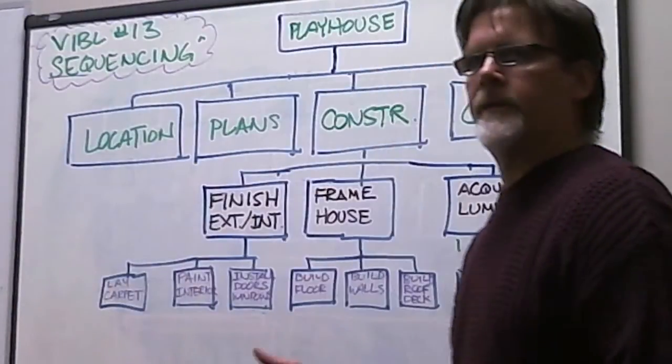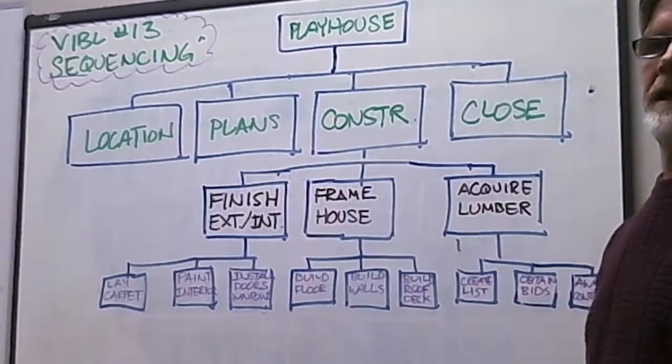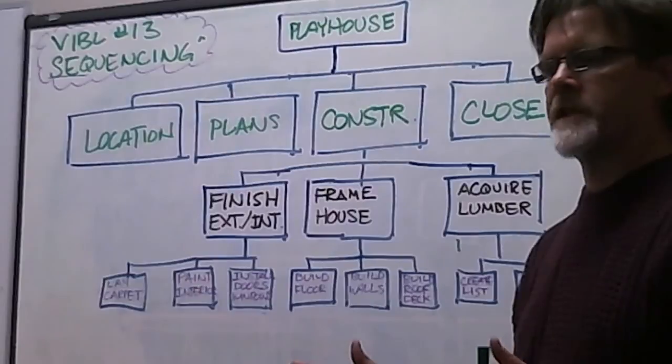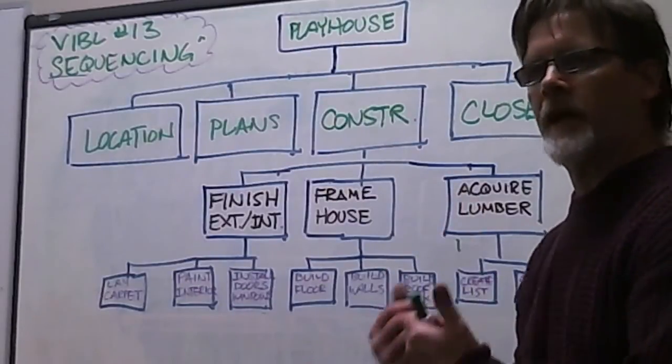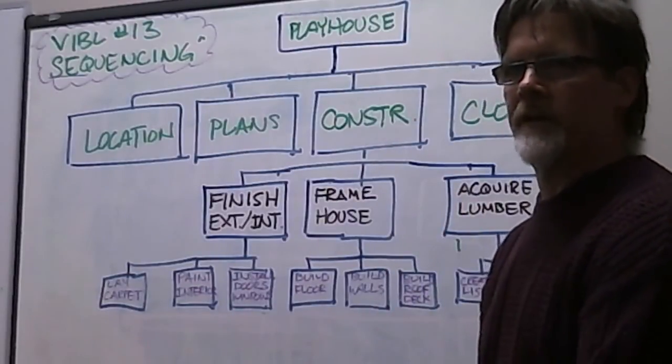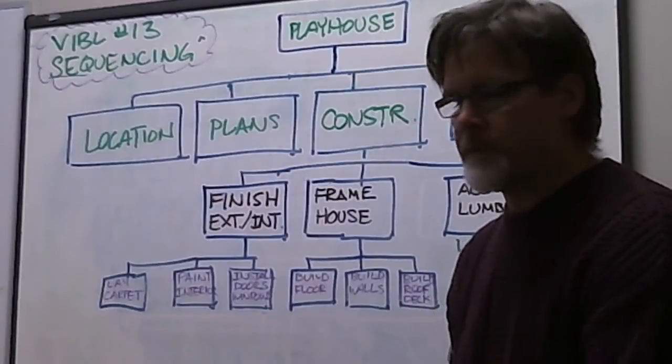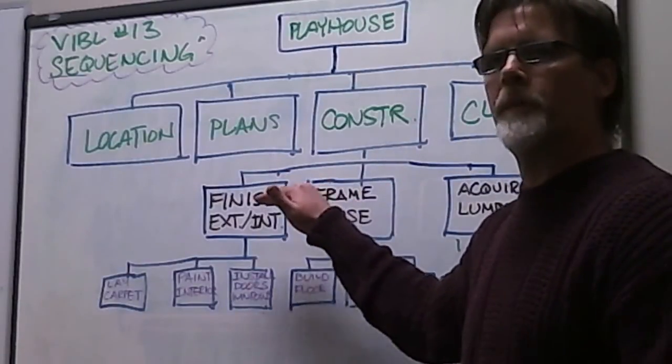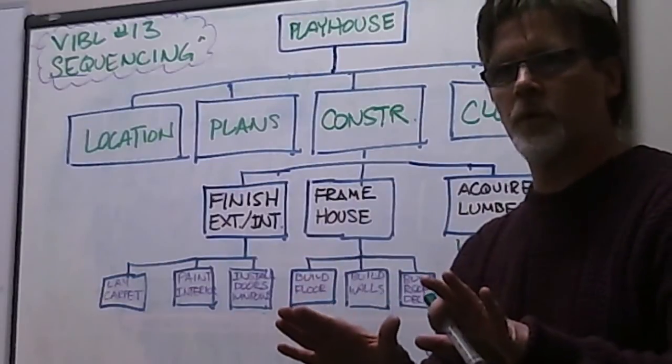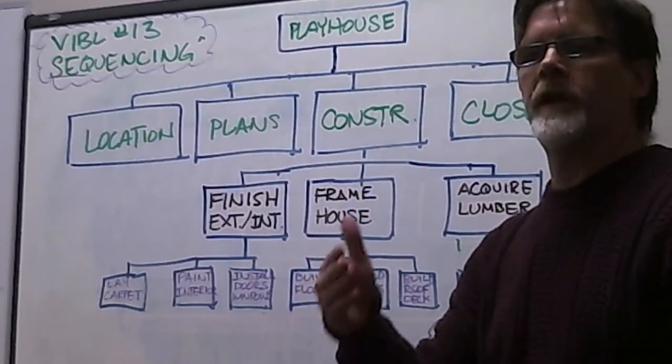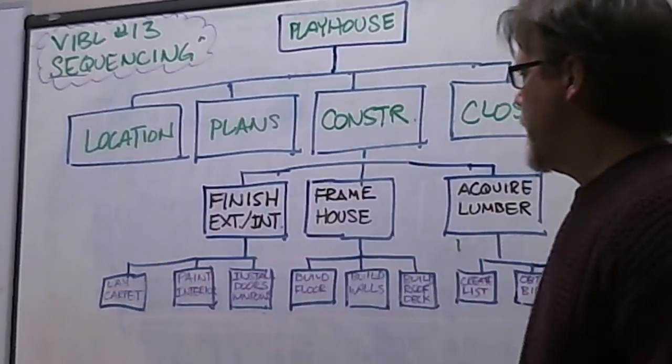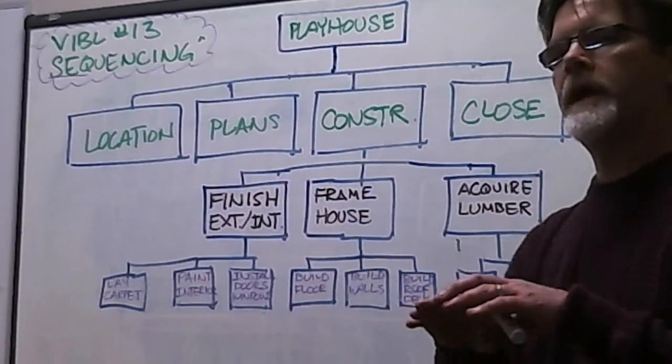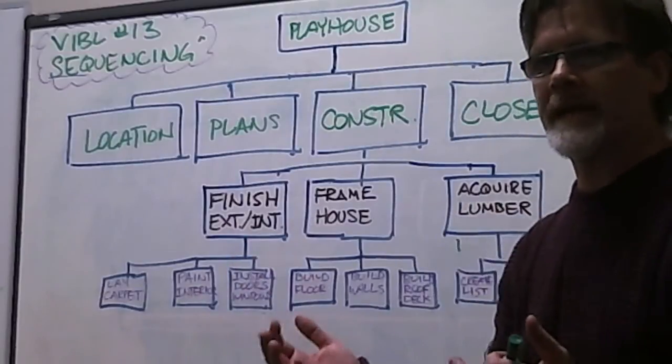As you look at the work breakdown structure of a playhouse, the two things I want you to remember is that when you decide to develop that sequence and the logic of the work and how it's to be performed, make sure that you're consistent with the tiers. So if you're going to do it from the work package level, then you stick with the work package level and make sure you develop your logical sequence that way. If you drop down and do the activity level, make sure that you develop your sequence based on the activity level.